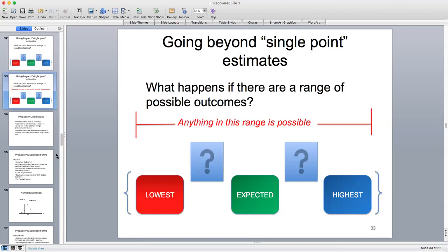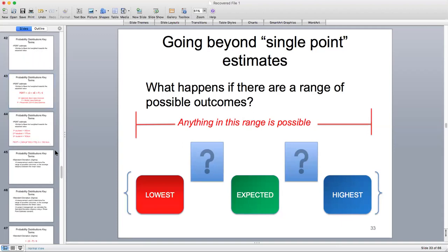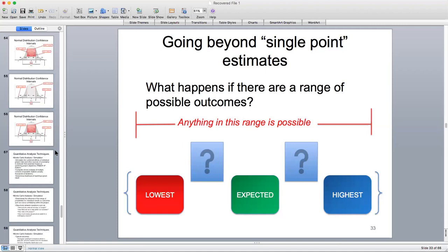instead of answering that by giving a number, we need to start learning to answer that question in terms of a confidence level. And the confidence level is determined by the sponsor, the organization's appetite towards risk, the amount of aversion they might have towards risk. The culture of the organization will determine that, so that we can answer the question in terms of a confidence level, and then from the confidence level, we can determine the corresponding value.